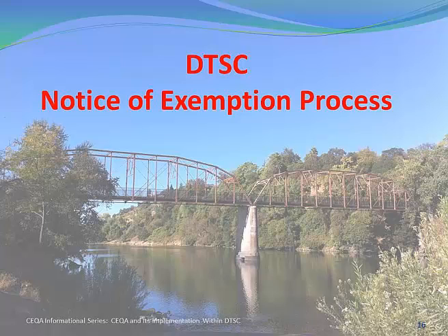If it's a situation where absolutely nothing has changed, we could do something like a memo to the file, documentation of our conclusion that nothing has changed. But it doesn't necessarily mean that we do an NOE, because NOEs are generally not appropriate where there has been previous CEQA review, unless you're doing something like a Class 1 permit modification where you're changing the name of the owner on the facility or something like that. That might still be appropriate for an NOE or just a general rule exception.